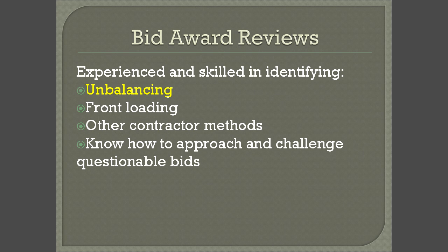One of the things we do for UDOT, after the project is opened for bid and before it's awarded, is run a program which compares the low bidder and second low bidder with the engineer's estimate, the cost-based estimating we have there. We look at the items which could be a problem in the future when you're building it. If one contractor is bidding an item at $25 and the other contractor is bidding it at $10, that's raising a flag. Why?